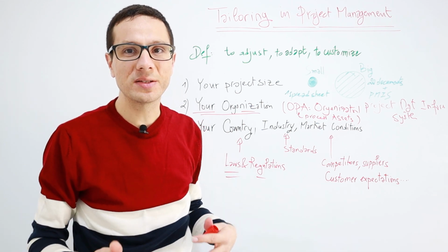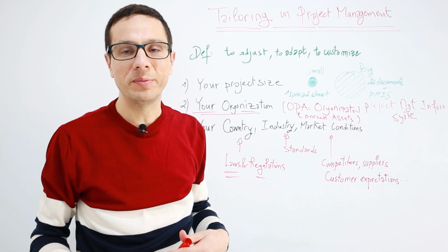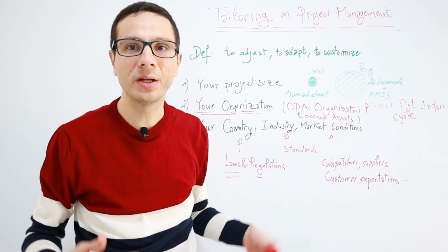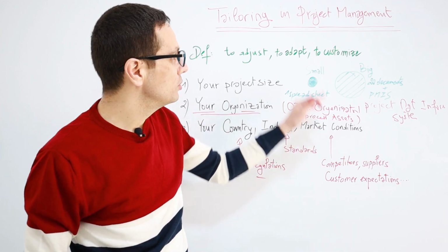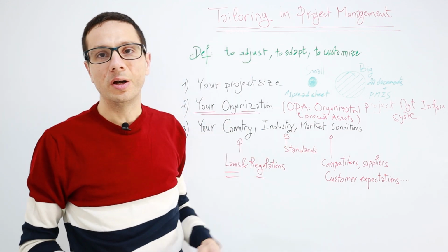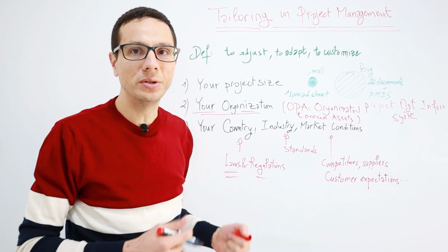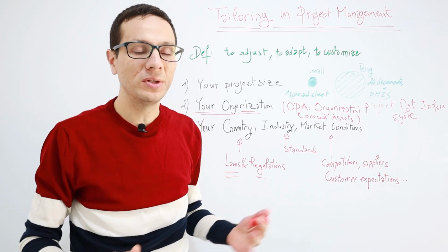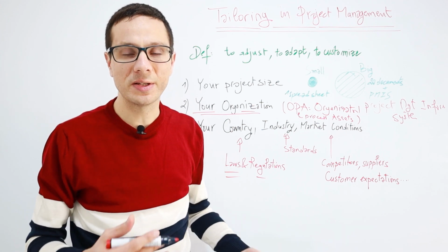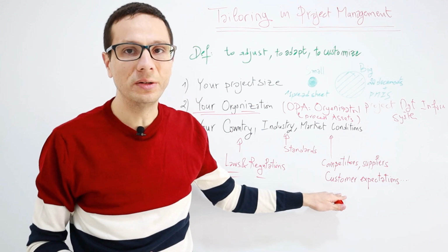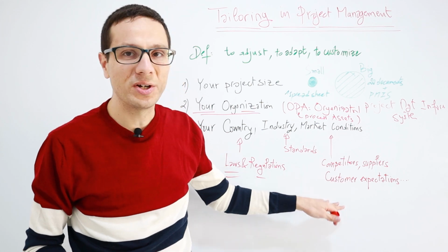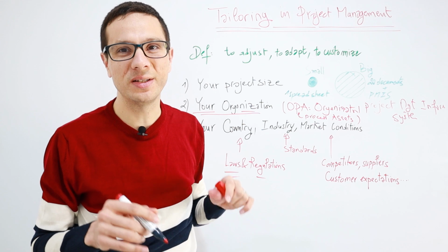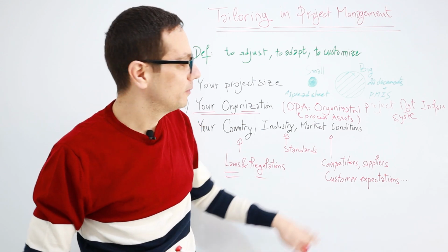And sometimes the customer requires frequent updates and some documentation and a status report every week and stuff like that. So you need to tailor your processes and add to your project that sending an update to the customer on a weekly basis is something that you should consider, because this project is different than the previous one and the customer in this project is very demanding.